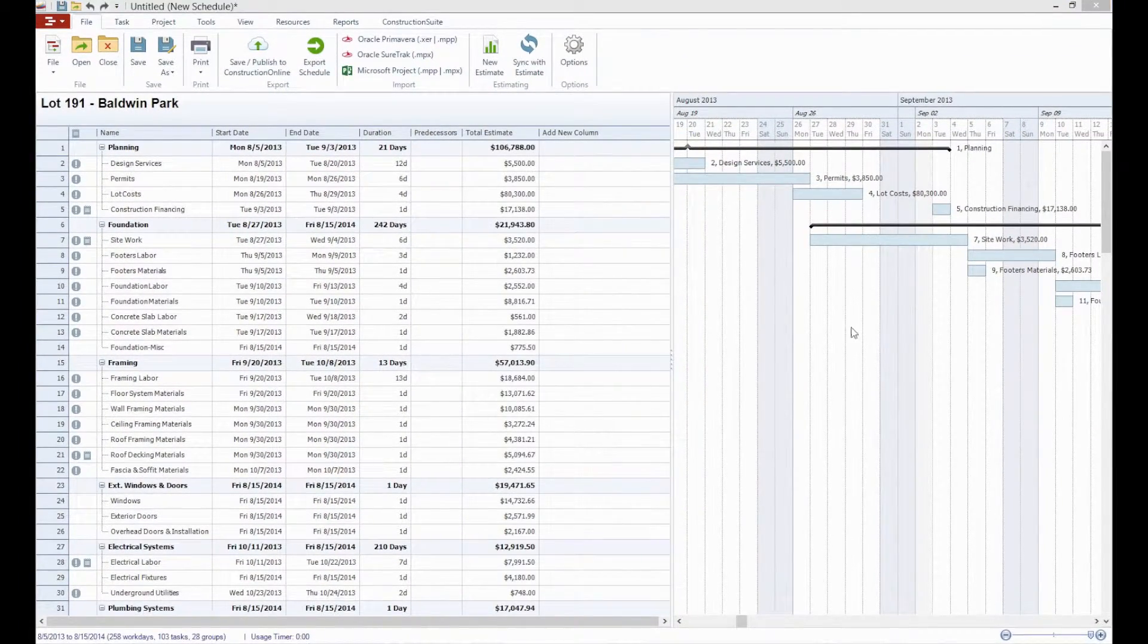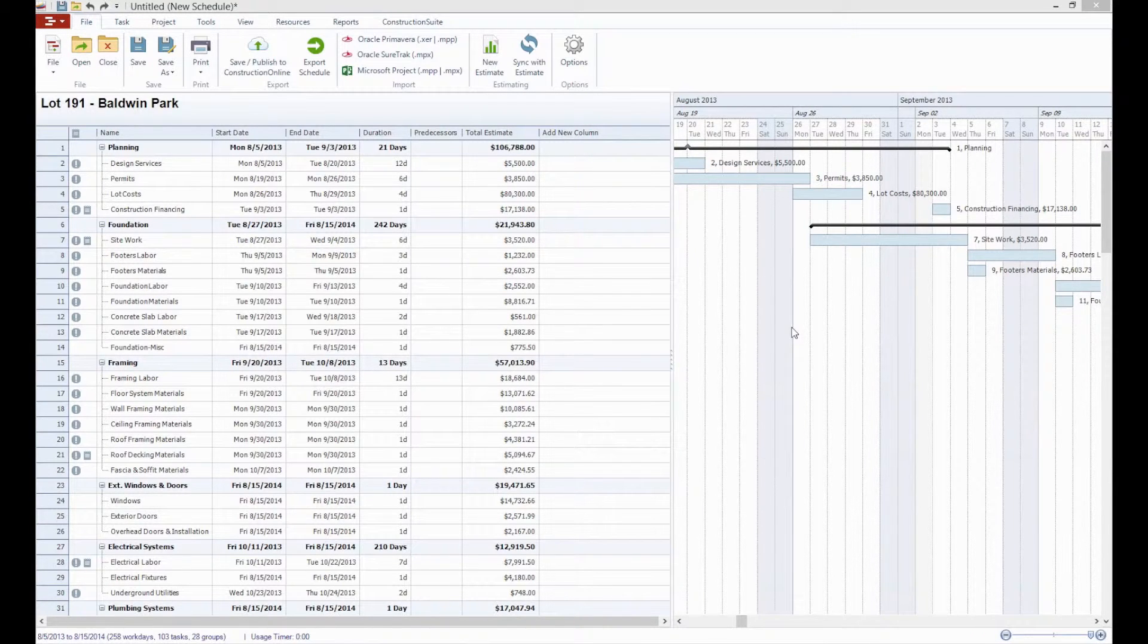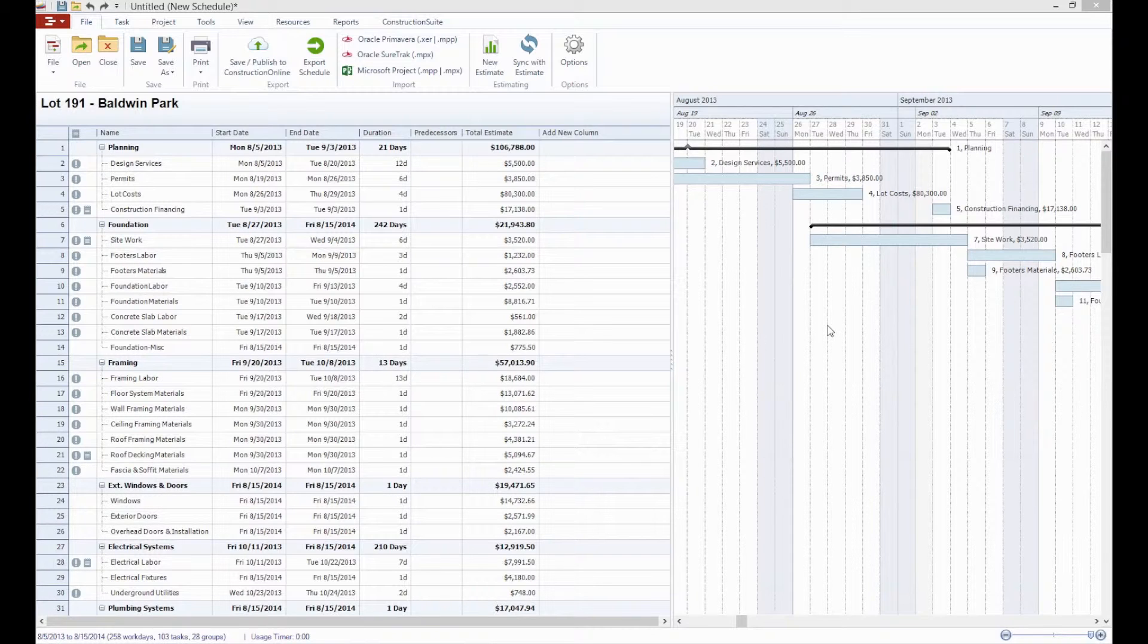This is valuable if you're interested in generating reports such as a cash flow report from the schedule, which will give you your projected income over time based on the estimated value and schedule duration of your tasks.